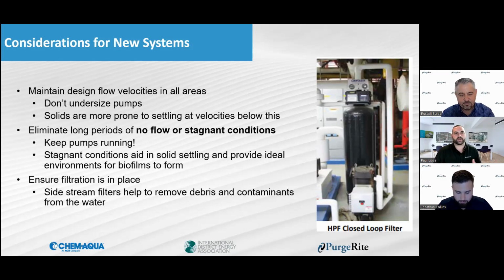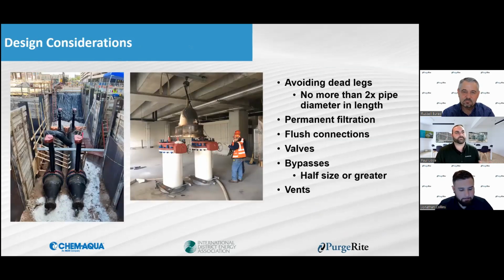Because mechanical contractors and engineering firms have that deadline: we need this building done by this date, or it's going to cost us X amount of money for each day that we go over. But from an owner and facility standpoint, you really want to make sure that your system is treated, passivated, clean, up to snuff before it even comes on. If you give yourself that time and reach out to the appropriate vendors beforehand, things can get staged.